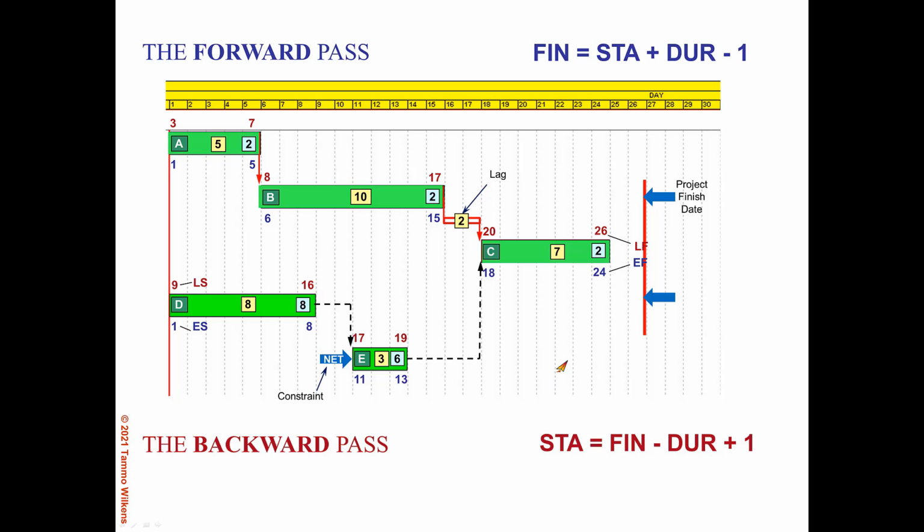So now we have a situation where we do not have a critical path. There isn't a single critical activity in this project. So to say that the longest path is the critical path is not correct in all situations. That is simply not true.